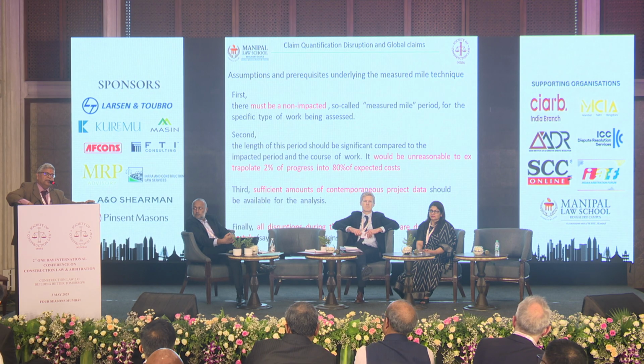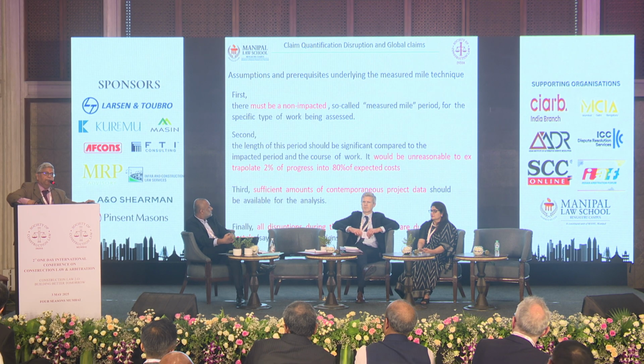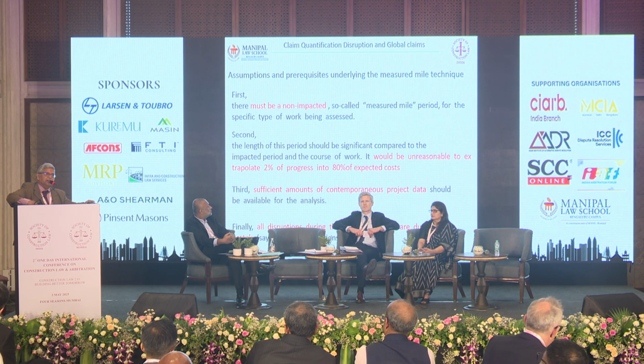Every day putting that in their daily report, our planned productivity was so much, we achieved only this much. Normally what contractors try to do to be in the good books of the employer, they overstate the achievement. Instead of telling 100 square meter we achieved, they try to say that we did 120 square meter today. When they try to overshoot that, it becomes difficult later on to prove that we were not working efficiently, for which the disruption cost have to be paid. So my general view is wherever we were advising, we tell don't manipulate, put the real figures. Then you have a chance of coming and proving after 5 years that these are all the daily reports.